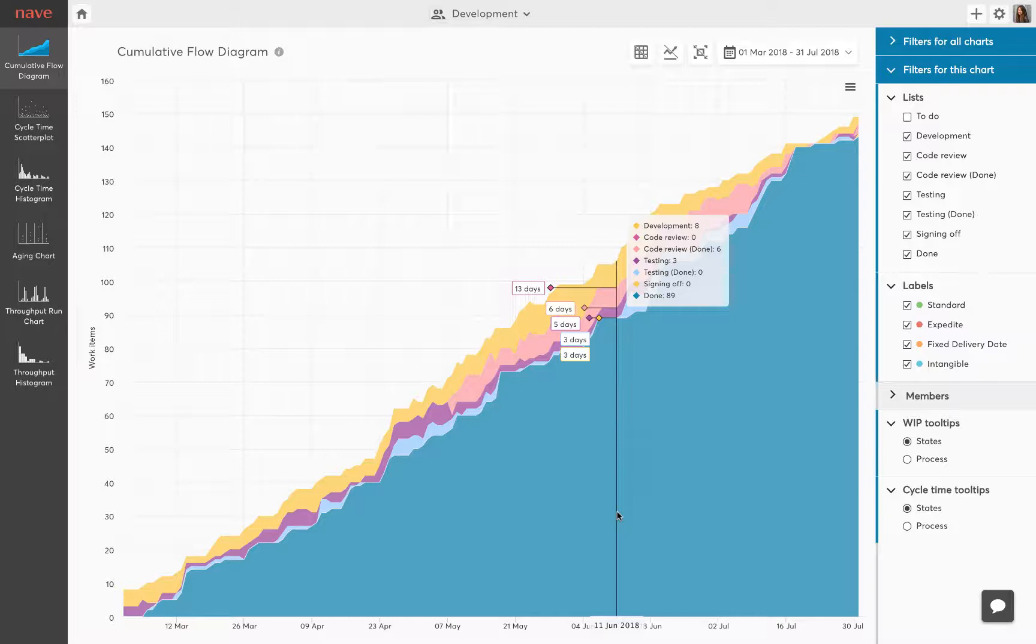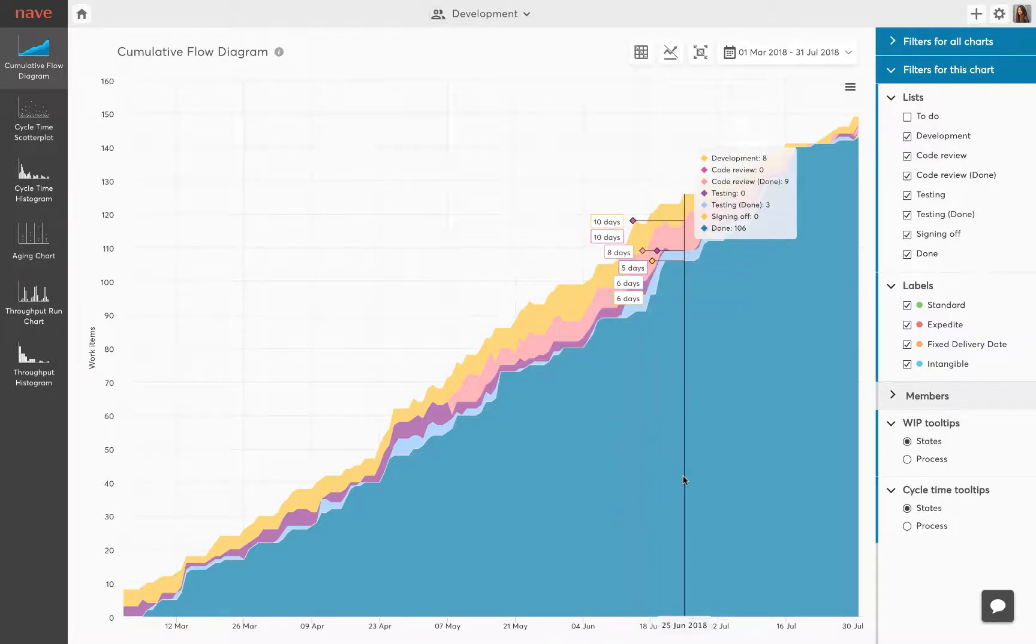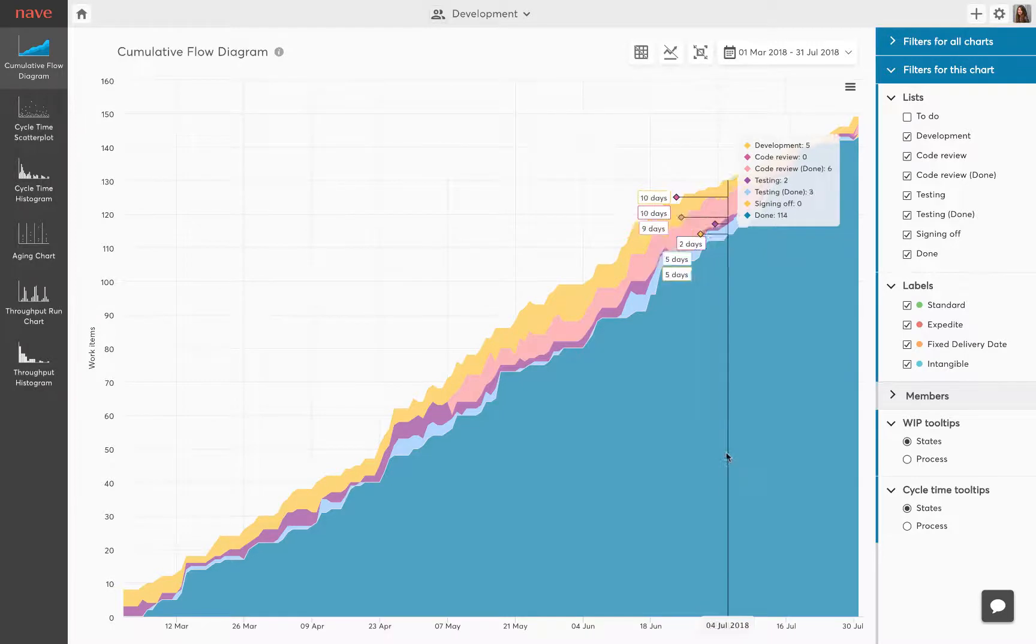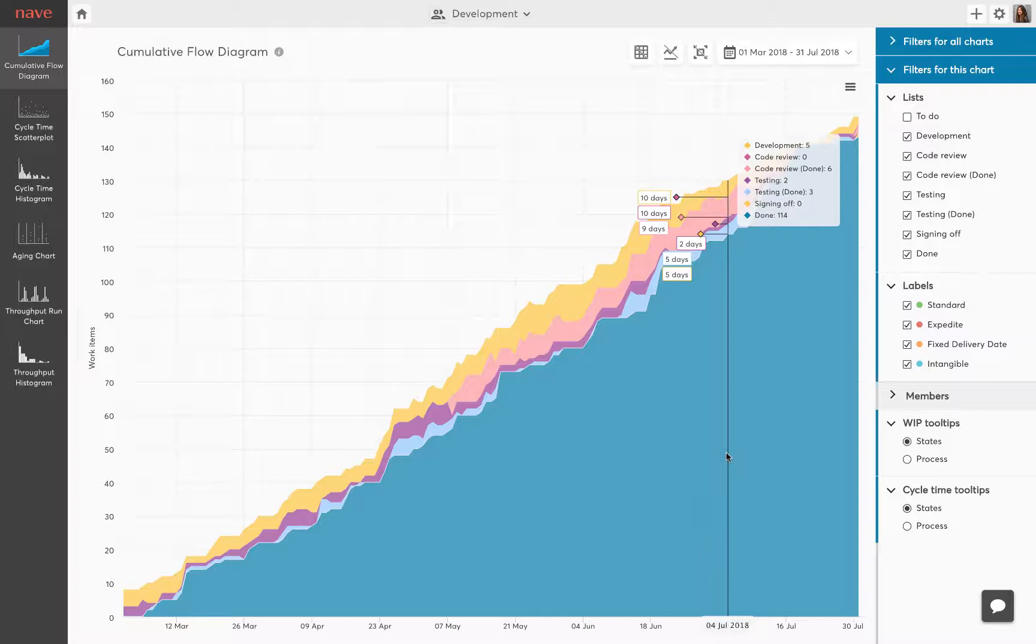The graph is built from colored bands with each band indicating how many tasks are present in each process state. In order to achieve an efficient workflow, you need to apply a work in progress limit. You can start with the limit around the number of your team members and adjust it later on.